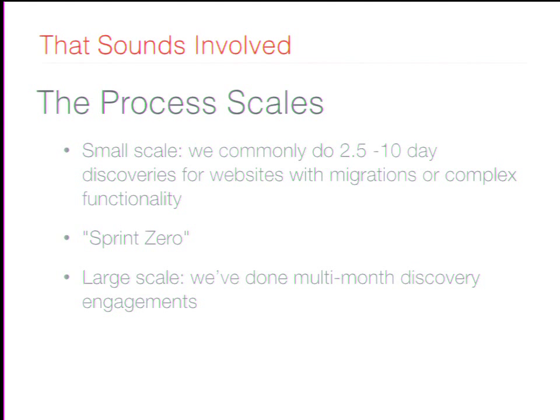We've also been pushing a lot lately for what we call sprint zero on our projects. This might be a very light sprint. It might only be 1 week. It might not be full time. But it brings the actual production team together and gets them in a room. A lot of this involves starting to build out the backlog. Ideally, they've got a product owner available. I'll talk more about product owners in a minute. But it's essentially getting the planning phase together when maybe a full-blown discovery isn't necessary, but at least getting the team planning and identifying some of the complex situations or higher priority tasks.